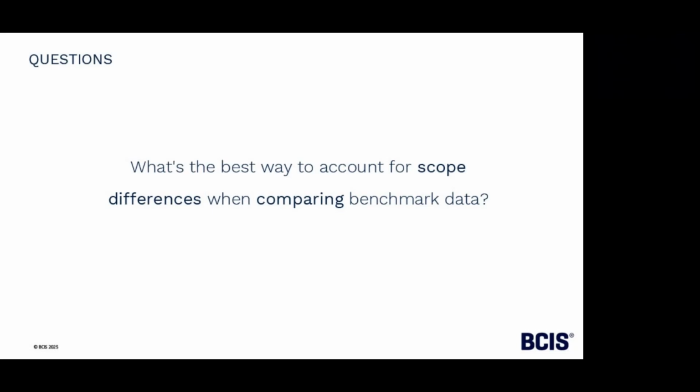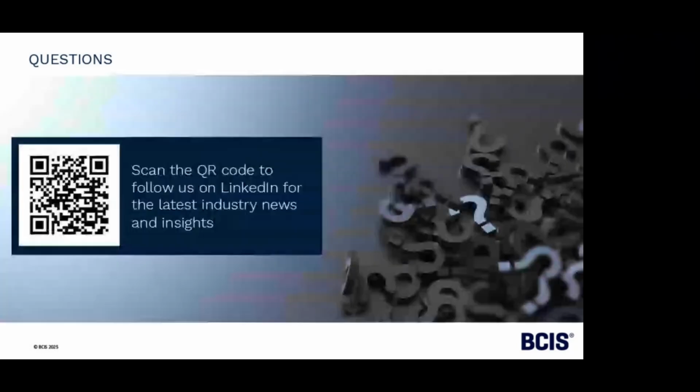But often the truth is that it's going to be up to the professional to make those adjustments. If you've got a few projects and one's got piling and the other one hasn't, or whatever it may be, then the professional is either going to have to use the data as is, with the caveat that it's not quite the same, or they will make a professional assessment to try and make them comparable. I think is probably my answer to that.